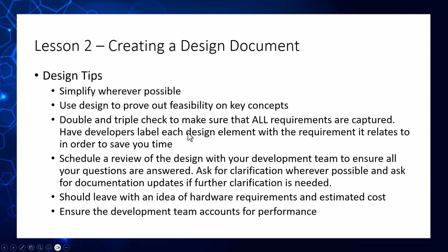And just some general tips to provide you with: look to simplify wherever possible. You can get very granular in detail in the design document, but you always want to balance how much is too much detail, where now you're delaying starting to build the application because you're designing it, versus being able to jump right in. You want to still provide enough detail to show the idea of what's happening and show that it's possible and how we're going to accomplish it, without getting into too much detail where it's starting to delay your project.